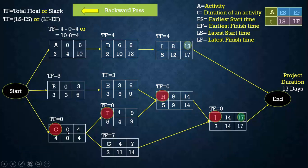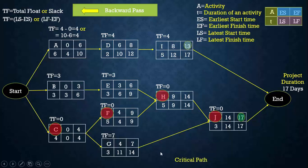For example, if activity C is delayed by one day, the total project duration increases by one day to 18 days. On the other hand, activity B is non-critical with a total float of 3, so it can be delayed up to 3 days — it can be started anywhere between day 0 and day 3 and finished anytime between day 3 and day 6. The critical path is C → F → H → J. Thank you for watching the lecture.